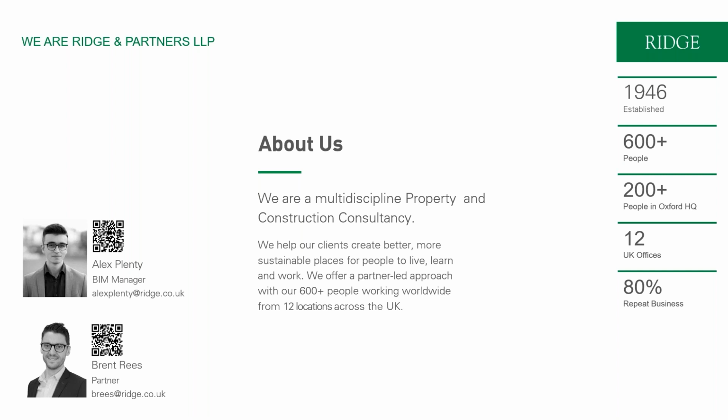And there are reports in the press of buildings that are at the point of handover and have had to retrospectively pull out fire stops and rework service spacing. Because of that, and because of Grenfell, the awareness is increasing in the industry that this has to be reformed. Where we're seeing the biggest uptake at the moment, rather than end clients, is with contractors, who recognise that they inherit quite a lot of risk through the tender process if the design and specification of the fire stops hasn't been well considered in the stages running up to that point.